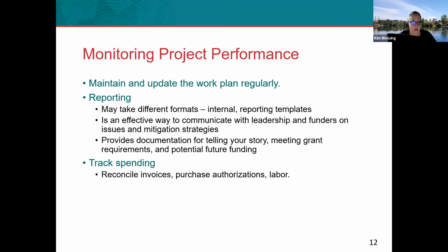And then tracking your spending, as I've mentioned previously, reconciling those invoices. So if you've authorized a spend on your contract and the work is then completed by vendors or people outside of your organization, and then they invoice you, you can compare that to your original authorization of the spend. And if you're tracking your budget closely and you have a process in place, then those costs won't be a surprise to you.